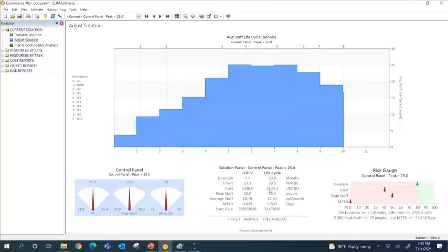It's going to throw the cost way up. I know that because of the historical data that's built into these tools. If I'm doing a homegrown spreadsheet or something like that, adding those people might have told me good news, right? But by using these tools and models, I can see, wow, that might not be a great idea.